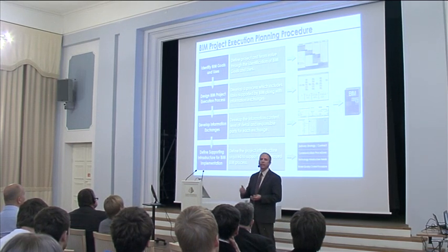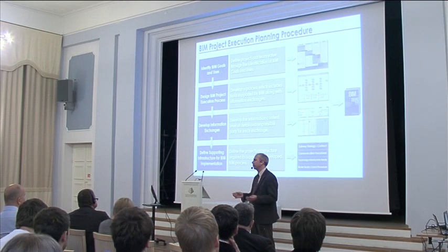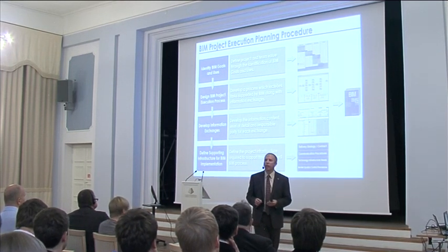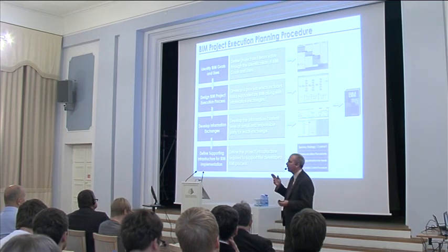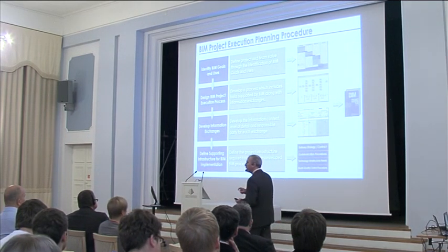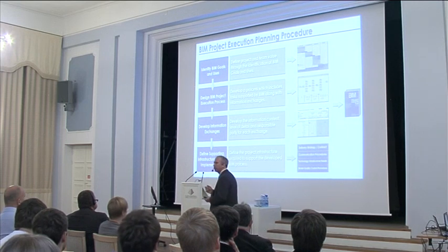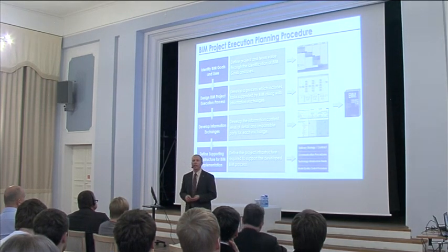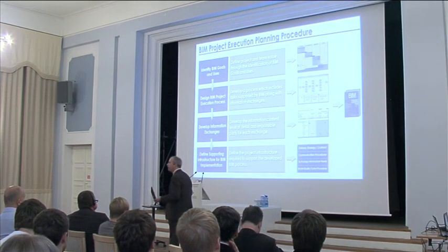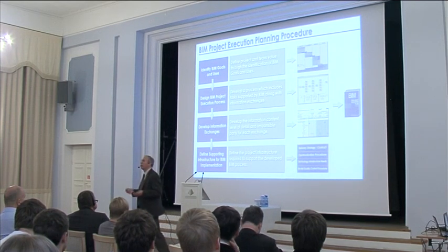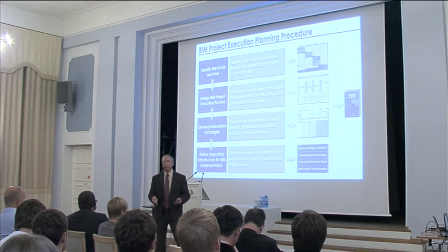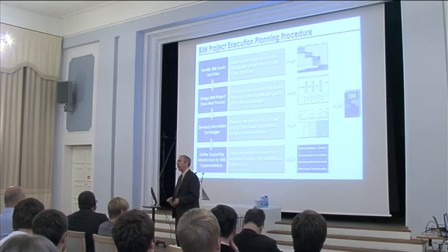And it proceeds down through designing a process so that you can look at how information will flow through the process, and then documenting those specific information exchanges that need to occur in the process, and ultimately defining the infrastructure you need. And by infrastructure, what we mean is things like the network, the people, collaborative spaces that you'll need to be able to implement your process.